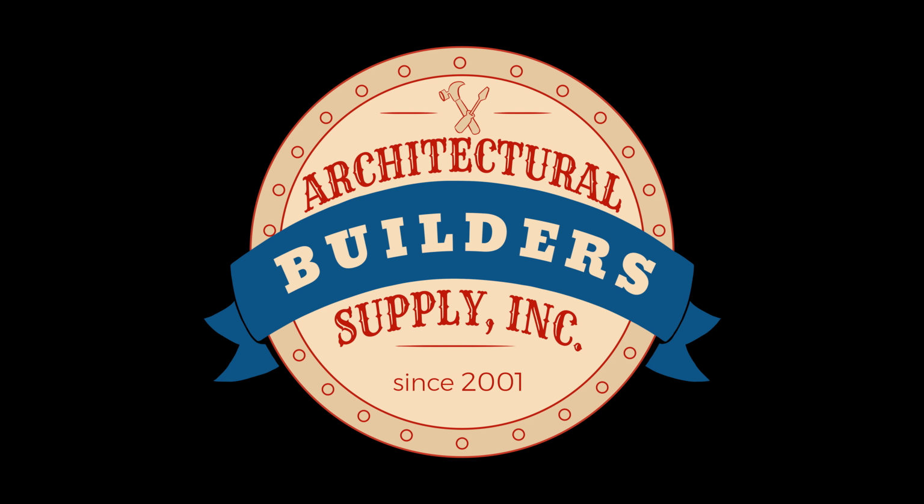Now, 4,000 sounds like it's way out of the ballpark, but that kind of door 10 years ago was $2,000. It's because of how it's constructed and the cost of the material that is required to build those doors. It's a lot of labor. It's a very expensive material. There's hardly any wood in the thing at all, other than just the veneer that you see, a little bit of wood on the edges. So you've bumped into that fire door being hyper expensive.